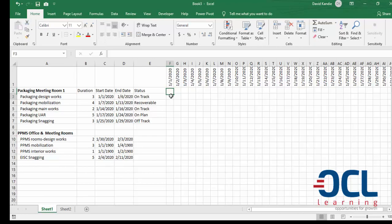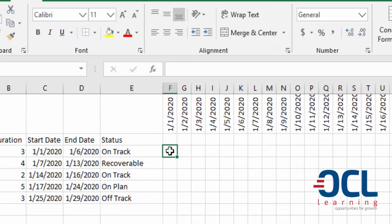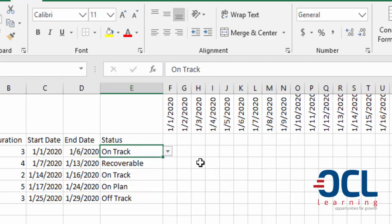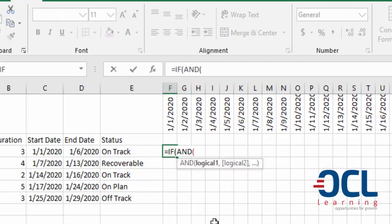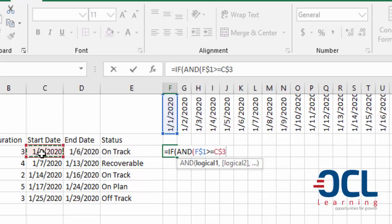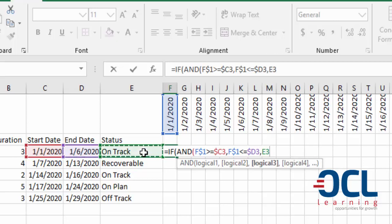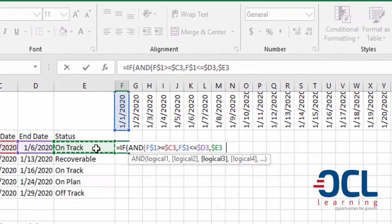Now we want to use a combination of logical IF functions. We write the IF function that marks these cells based on the start date, the end date, and the task status. I'll write: IF, and then check if this cell F1 — locked with F4 on the row — is greater than or equal to the start date, and the date is less than or equal to the end date, and the task status — with the column locked — equals 'on track', then return the letter A.